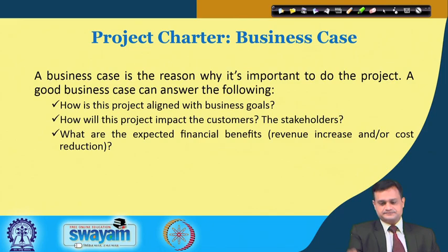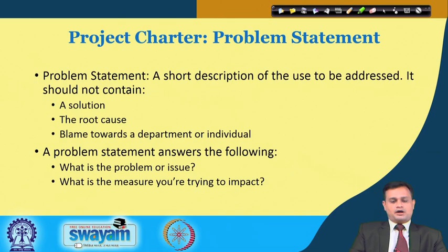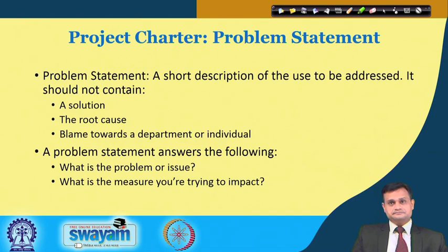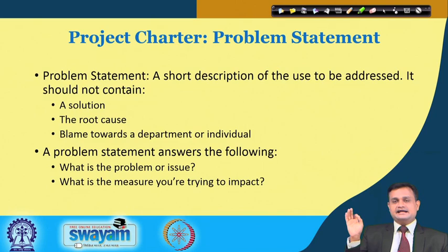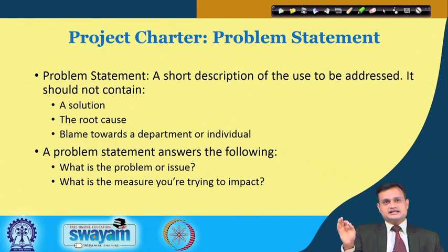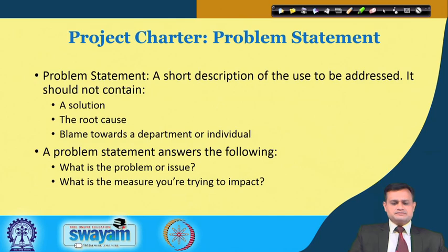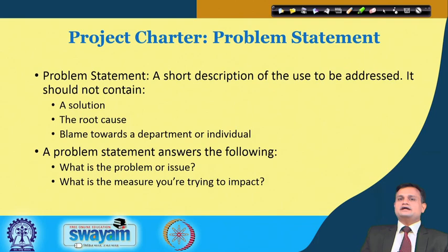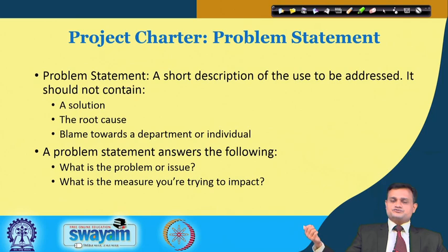The second element is the problem statement — basically a short description of the issue to be addressed. It should not contain a solution, root cause, or blame towards a department or individual. Let the problem statement only highlight the gravity of the problem; if there is any personal issue or root cause, the team will get biased. The problem statement typically answers: what is the problem under investigation, what measure are you trying to impact, and where the impact will be seen — whether in customer satisfaction, improved delivery, or customer loyalty.